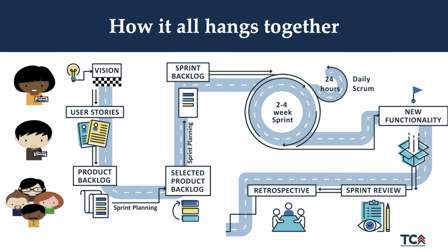Now, this is an opportunity for the developers and the Scrum team as a whole to present what they've done to key stakeholders and also get feedback from the key stakeholders. It usually takes the form of a demo, a product demonstration where they demonstrate the new functionality to the key stakeholders, get their inputs into the new functionality, and in some cases, avail the new functionality to the key stakeholders for them to interact with and get a first-hand feel for that particular product.